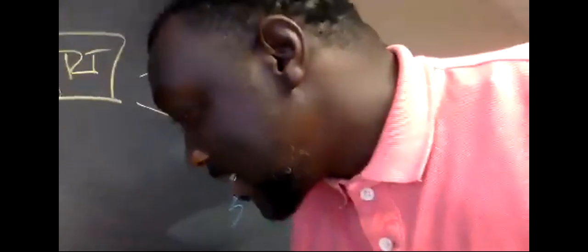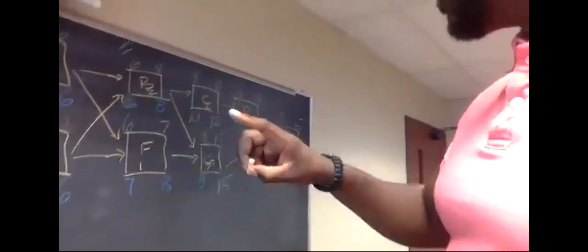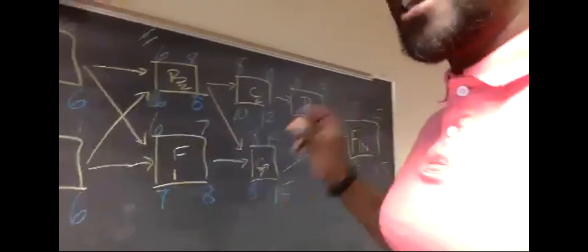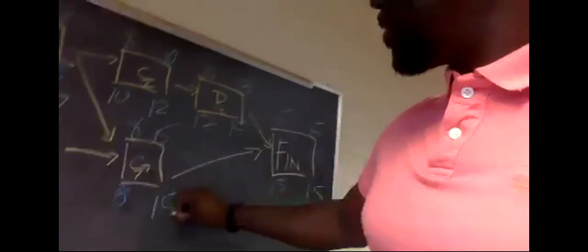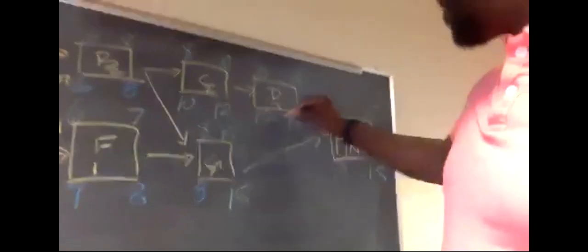All right, so we drew up the critical path. We drew our diagram. We calculated forward pass. We calculated backwards pass. Now we calculate float. To calculate float, you can take either the start or the finish side, but whichever path ends in 0, that's our critical path. I'm going to take the finish side. 15 minus 15 is 0. We know that one is 0.